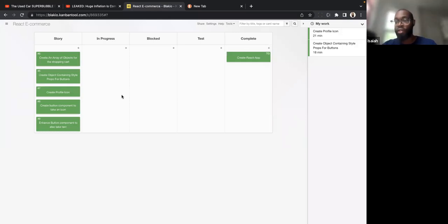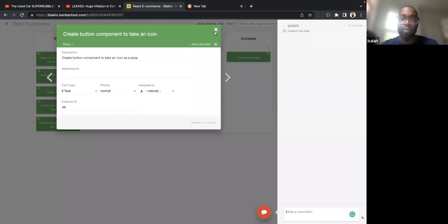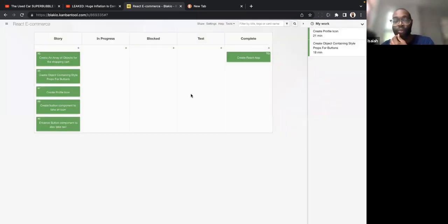When we're using Jira, the actual one that's used at work, there's a field to do this. You can link tickets together, or you can link dependencies together. This ticket depends on that ticket, so you can't start that other ticket until you complete this one. So yeah, that's how y'all should do it with those.